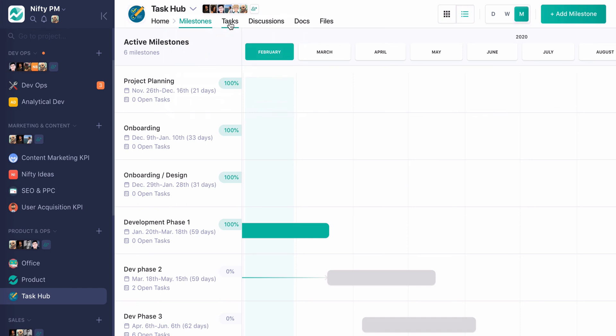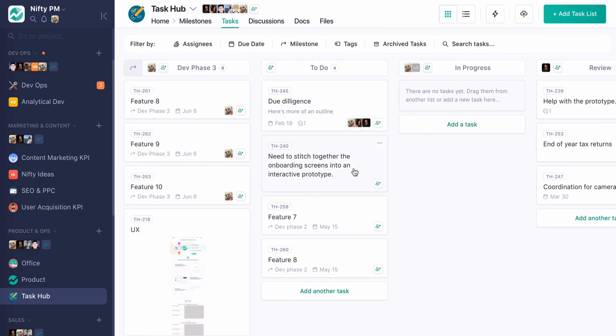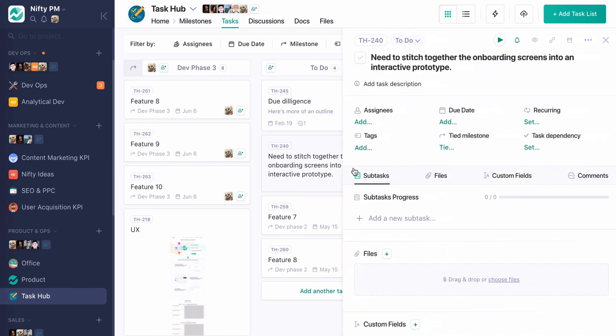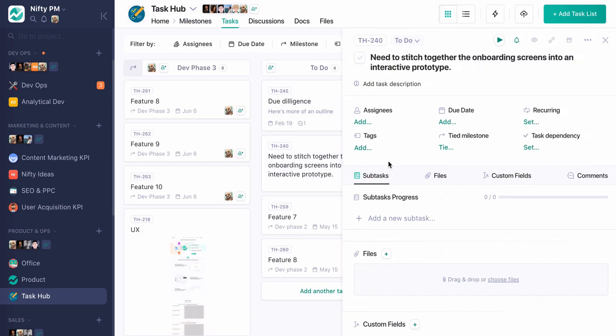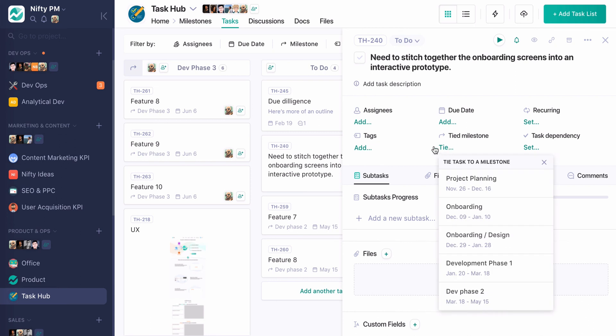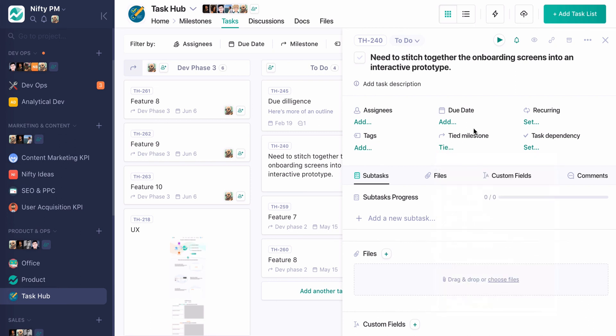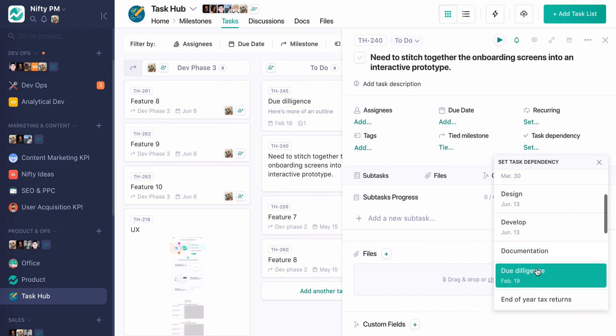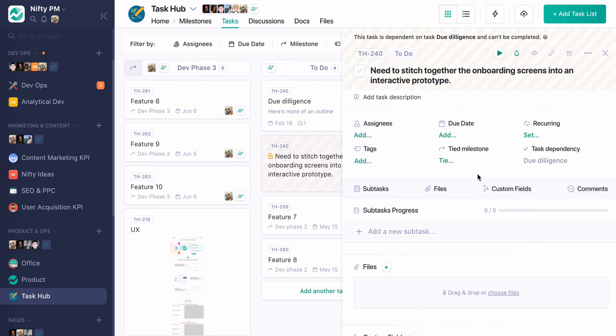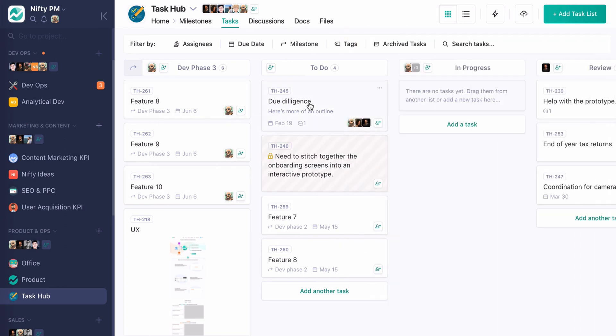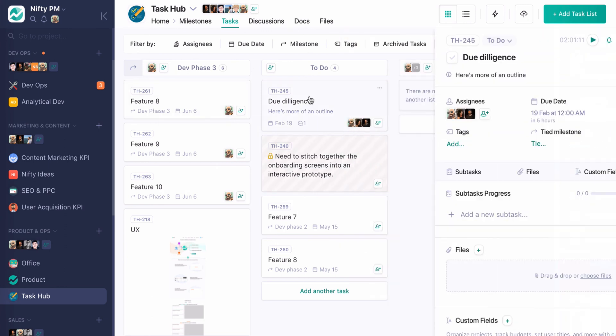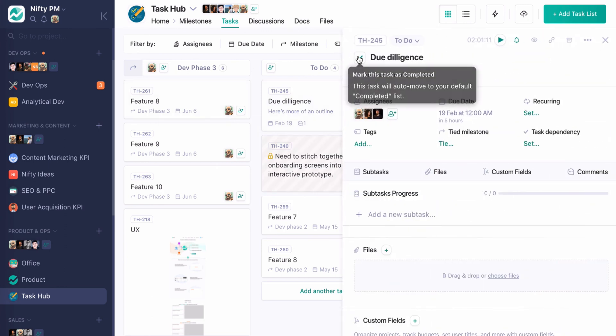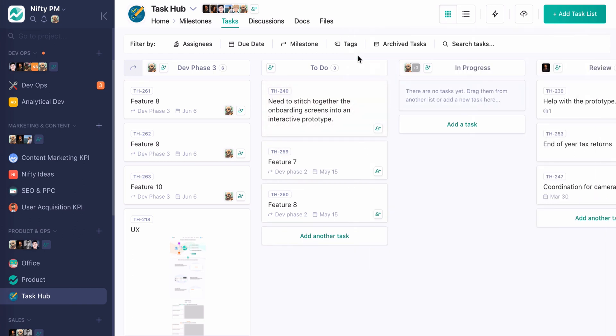But you also might find that doing a linear task dependency. So I want to set this based on a specific task. Let's say due diligence. So now this one is locked and cannot be completed until the due diligence task is completed, in which case now it's unlocked. And so there's, again, two different ways to do it. Tasks, I think, is a little bit more linear because I can make it X, then Y, then Z, where milestone dependencies are bulk, I do them in large clusters based on that milestone's completion.